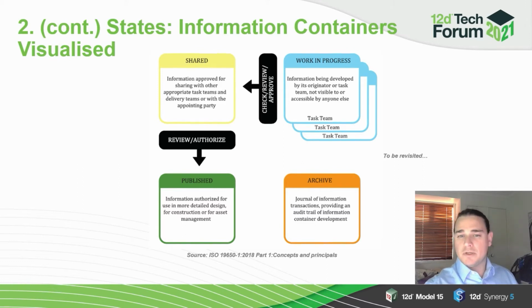These tasks happen in isolation simply because the development of that information, whether that be a document, a model, or otherwise, still requires input only at that disciplinary level. In other terms, the value of input from the wider team cannot yet be realized, is not yet potentially applicable. And so the siloing of tasks to potentially a discipline in a work in progress state therefore makes sense.